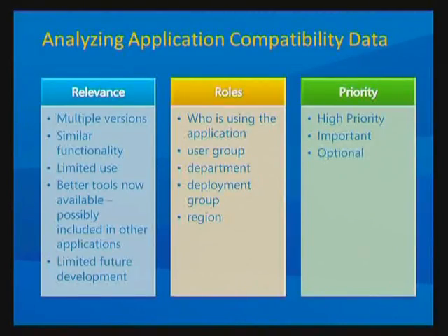When you get deeper into your testing, you're going to have to look for in-house application dependencies on some of those older apps, or maybe looking at alternatives like SoftGrid. But you can usually shrink that list down pretty quickly. The other thing to go to is limited use. How many people are actually using the application? If you have an in-house line of business application that's using a version of Java or JInitiator or one of the technologies that we know is not going to be updated for Vista, you need to look at how many people are using it, what's the business value to you of that particular application, and can you merge applications together?